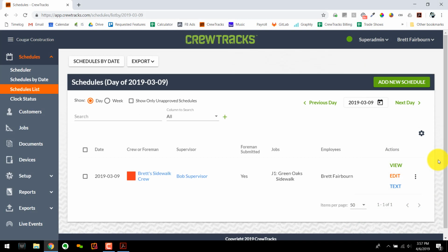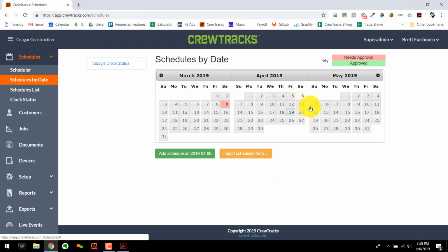Let me show you what this looks like in practice in CrewTracks. Here on March 9th, I have a schedule for Brett's Sidewalk crew. This is the schedule you've seen in a couple other of our videos, but today's date, as I record this, is April 6th. I'll go to schedules by date. You'll see there's nothing between the 9th and the 6th. So even though there's a big long gap between here, when I create a schedule on the 6th, it's going to look back for any documents based on the context, like the job or the equipment that's included on the new schedule. It's going to look back for the previous schedule with the same foreman or crew and check if there's any multi-day documents that need to be carried forward.